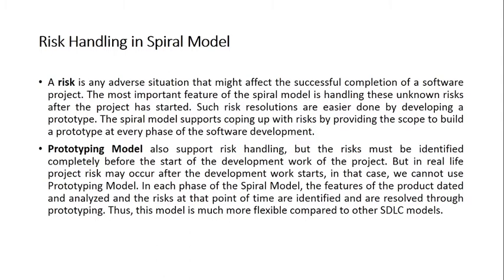But if you don't have anything in hand, you just have the requirement document, you haven't developed anything, and from that requirement you need to guess or identify all those risks which might come true. What is the probability that this risk will come in your project? So that is an unknown risk, right? We don't know anything about that because we haven't developed anything yet. So it's a very challenging task also, right? Such risk resolutions are more easily done by developing a prototype. So generally we go for making a prototype in order to help in identifying such types of risk.